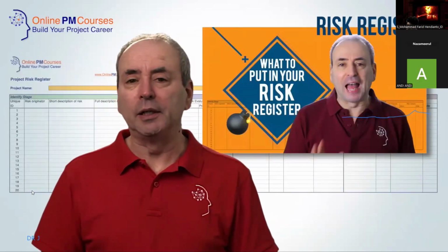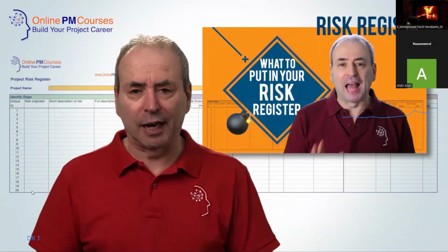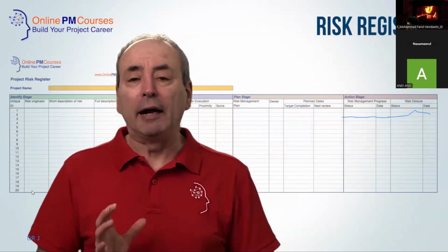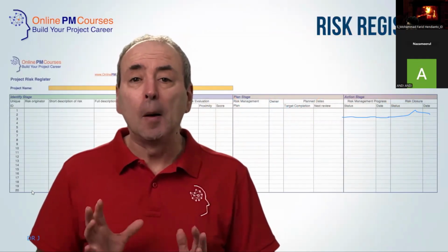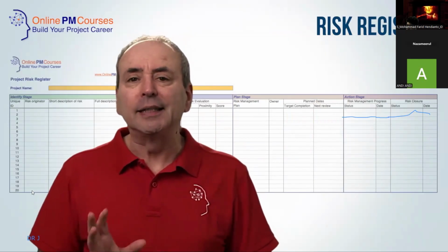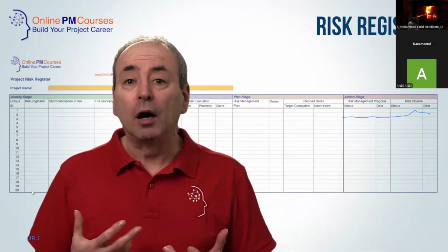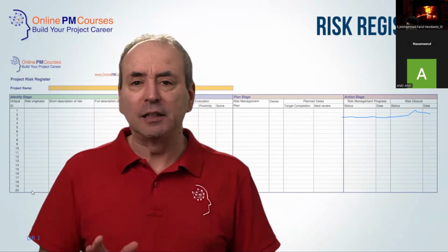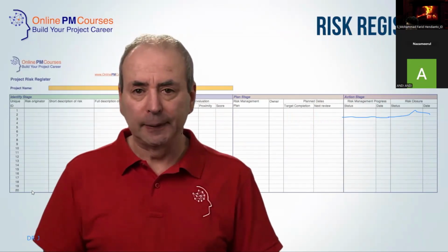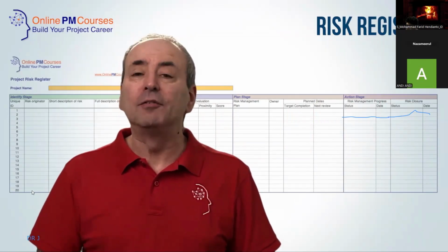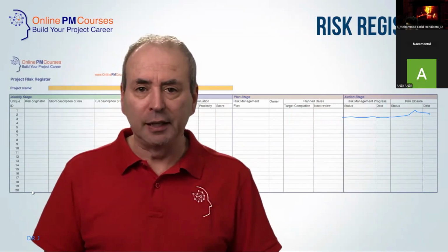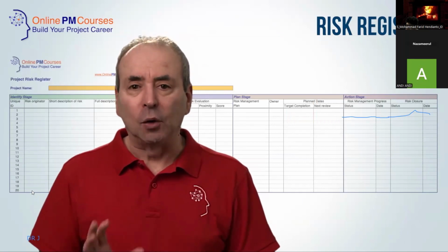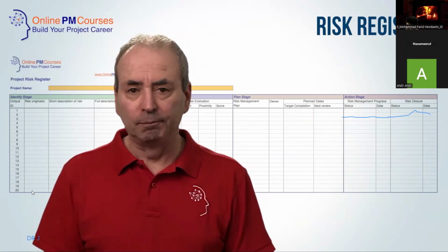The second key tool that we use on risk management is the risk register, and I have a whole video on how to create a risk register. Sometimes called a risk log, a risk register is a tool that serves 2 principal purposes. Firstly, it is a management tool. We record all of our risks and all of the information about them on our risk register so that we can actively manage those risks and track our progress. It's the tool we use to identify which risks we haven't addressed recently, and so we can turn our attention to them and do something about them. It's also the tool that we record the progress on.